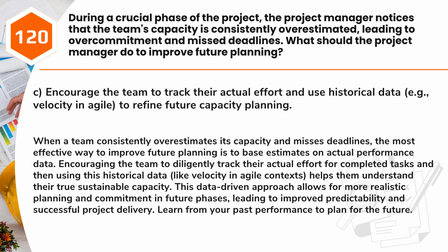Encouraging the team to diligently track their actual effort for completed tasks and then using this historical data, like velocity in Agile contexts, helps them understand their true sustainable capacity. This data-driven approach allows for more realistic planning and commitment in future phases, leading to improved predictability and successful project delivery. Learn from your past performance to plan for the future.